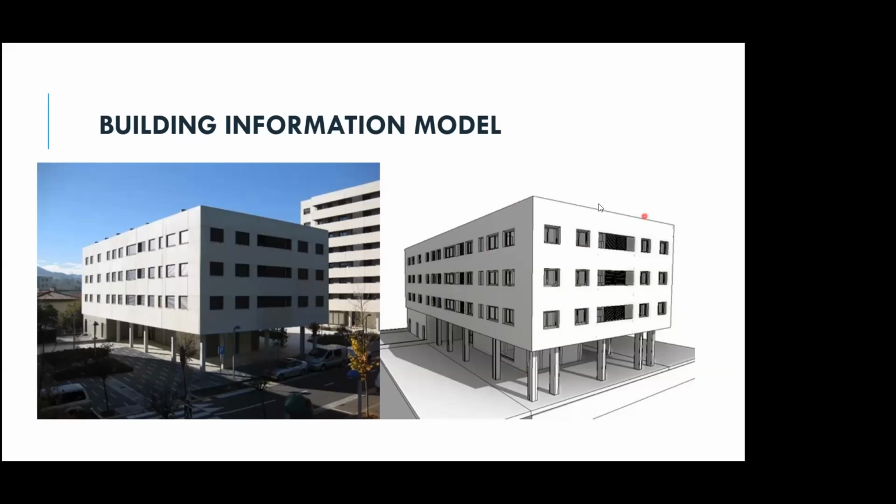So what we did, we created a 3D intelligent model, and we extracted information such as quantity estimation, the architectural drawings, structural drawings, MEP drawings, shop drawings, and as-built drawings, whatever we can extract from this particular model, and put it on the site and do the actual construction. So this is how the overall BIM workflow works, right?